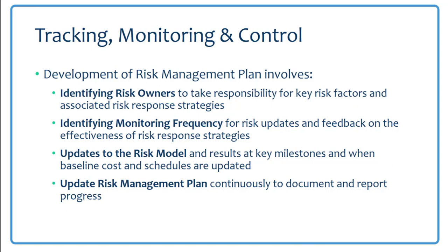You may need to update the risk model as things occur, or once risks are realized or it's determined that they are not going to happen because you've passed the trigger point. So you'll continue to manage the risks, you'll update your risk management plan, and you'll rerun the model as necessary.